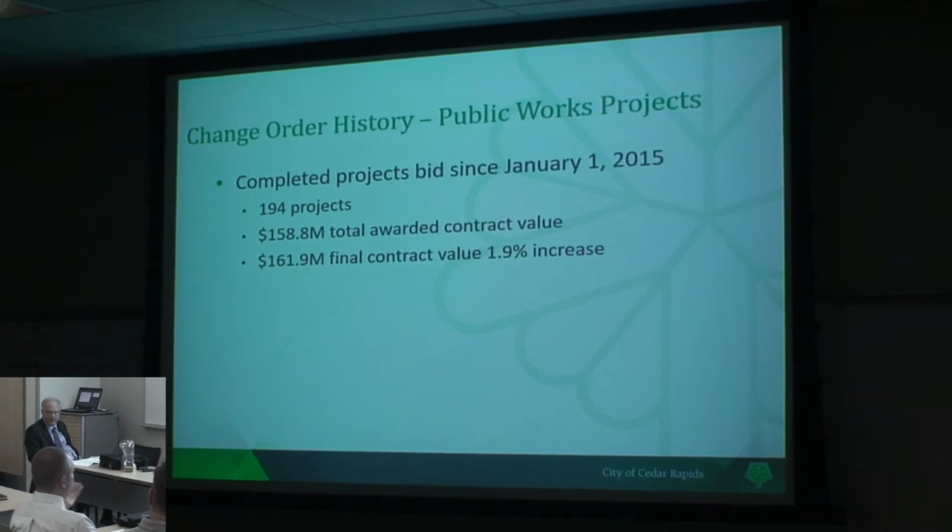It does, yeah. And one good thing to note with that comment is we will see a change order on every single project. Because when we go to close out a project, the way that our finances work here, we have to reconcile that balance at the end. And it never turns out to be exactly what we planned. So no matter what, even if we have to do a $50 change order at the end, so that what we paid out and what was budgeted is the same, we still have to do that. So every project we will see a change order, for sure.